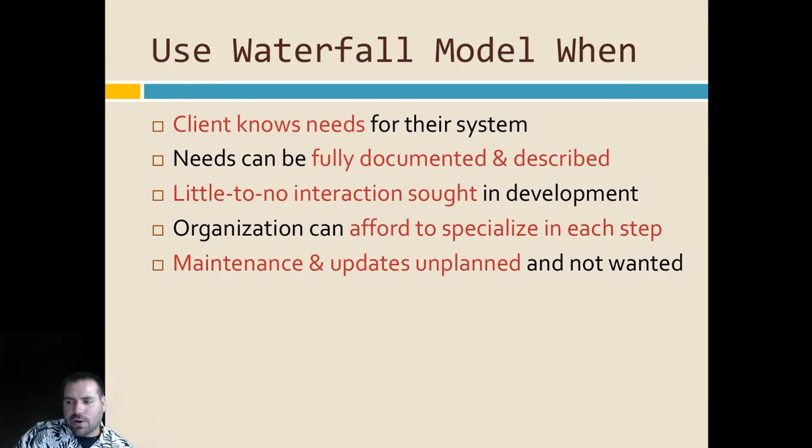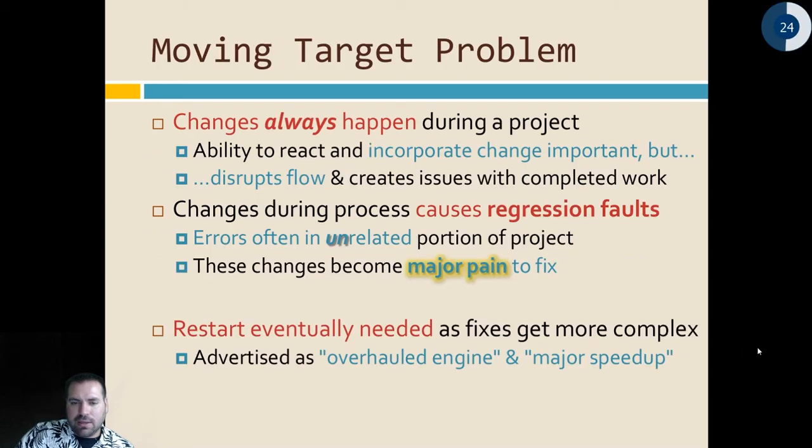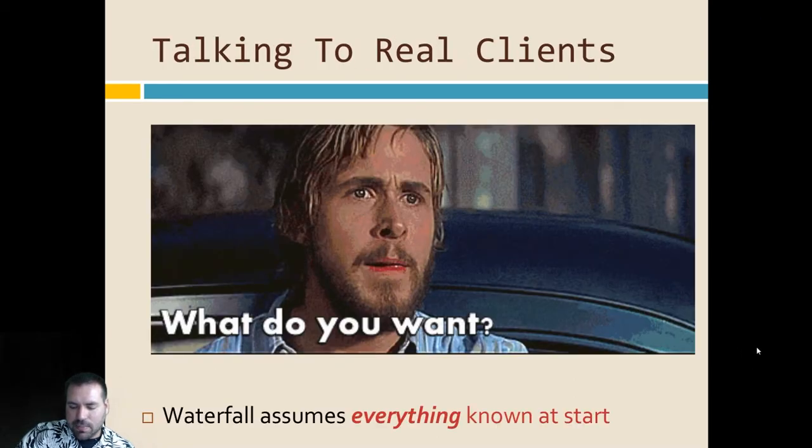That's where waterfall works. Waterfall has that advantage: you're delivering to the customer once, it's fully tested, and you're guaranteed that it works. But let's just get to the other ones. Most of the other development life cycles we'll talk about deliver incomplete software multiple times. You can't do that in a 747 or a defibrillator or an automatic trader that trades on the markets. So anyway, that's one defense of waterfall in those industries.